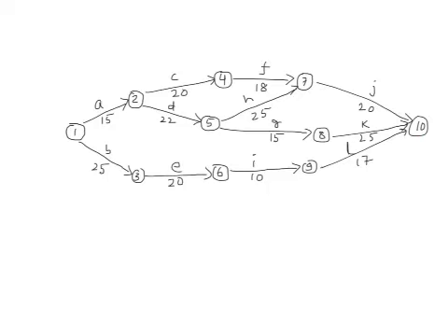So the idea here is that for the start node we take the earliest time as 0, and then for node 2 the earliest time will be 0 plus activity time connecting node 1 with 2. So 0 plus 15, 15 is the earliest time for node 2.